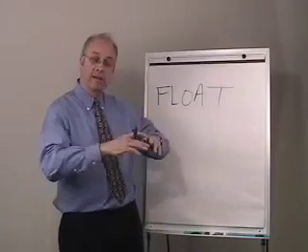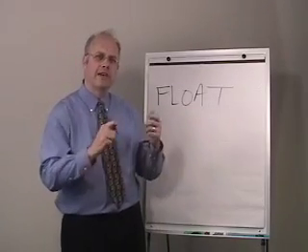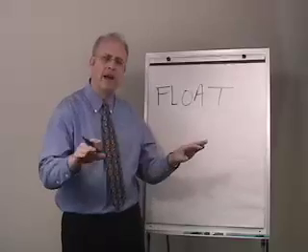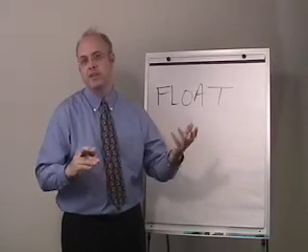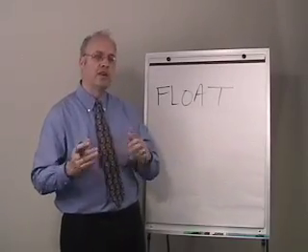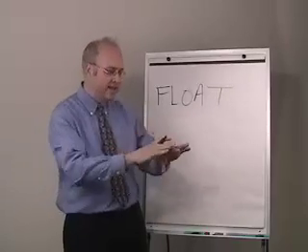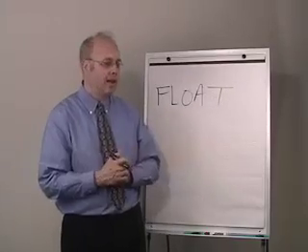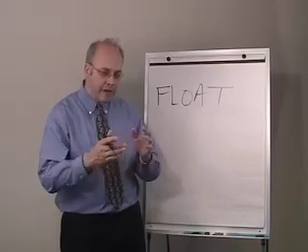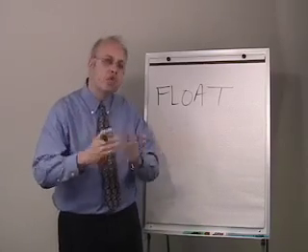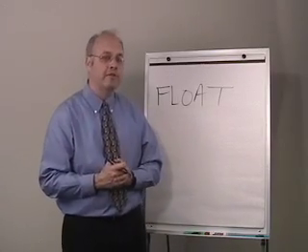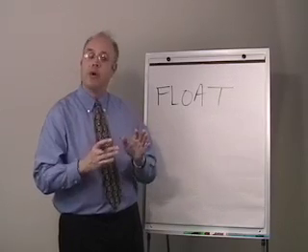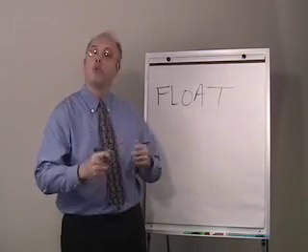In other words, again, using our pile driving example, if I, as a contractor, mobilized fewer rigs than would be necessary to complete all the work at once, but instead sort of strung it out using fewer rigs, eventually I might consume all the float associated with the pile driving activities, and at that point I could not go with fewer rigs.